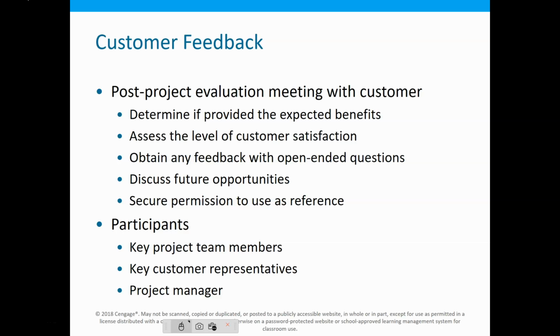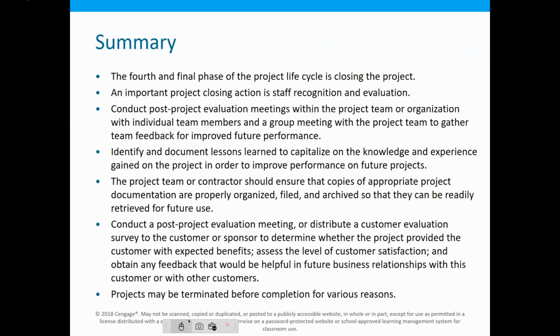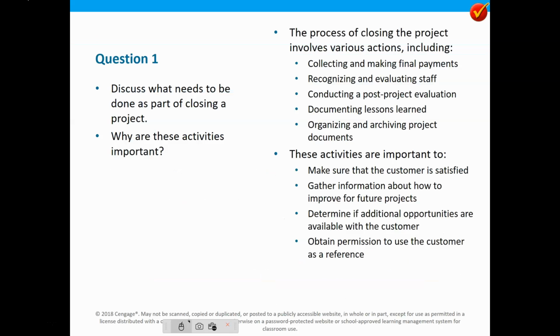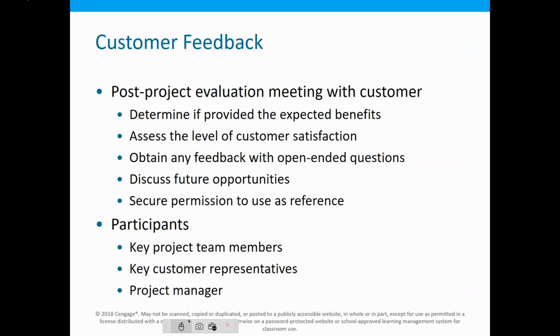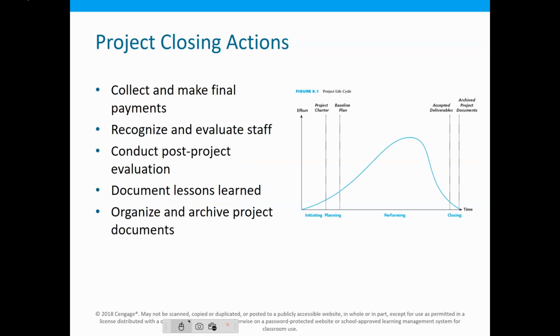Let me scroll back to this chart. Lisa's been our project manager, and we get to about here, and all of a sudden we pull Lisa and start her on another project. And we bring in a dedicated group of closers. Sometimes those closing activities are different enough that it makes sense for us to bring in dedicated closing project managers.